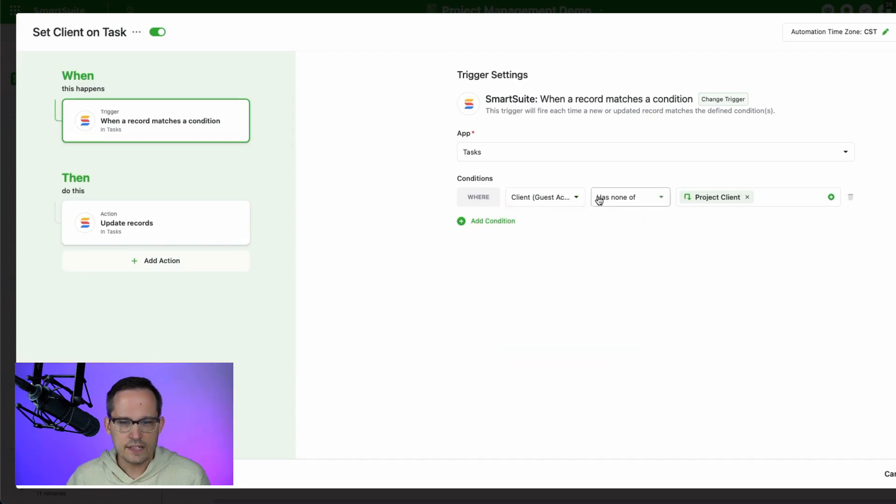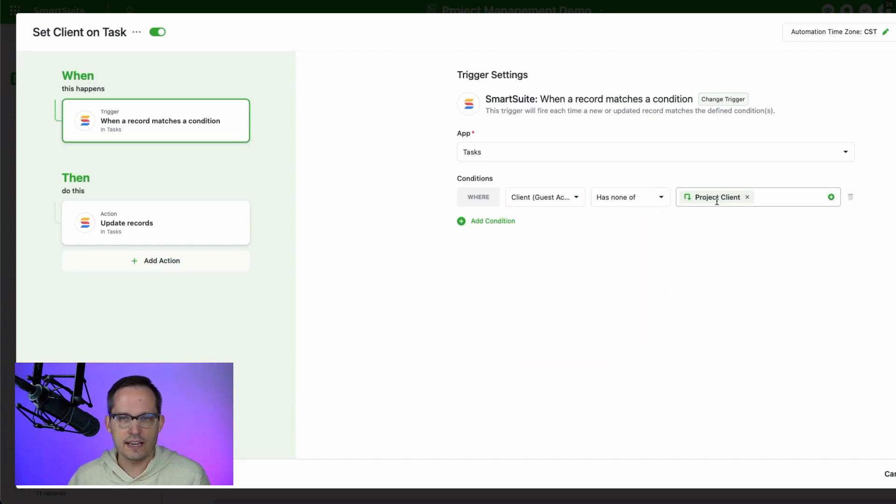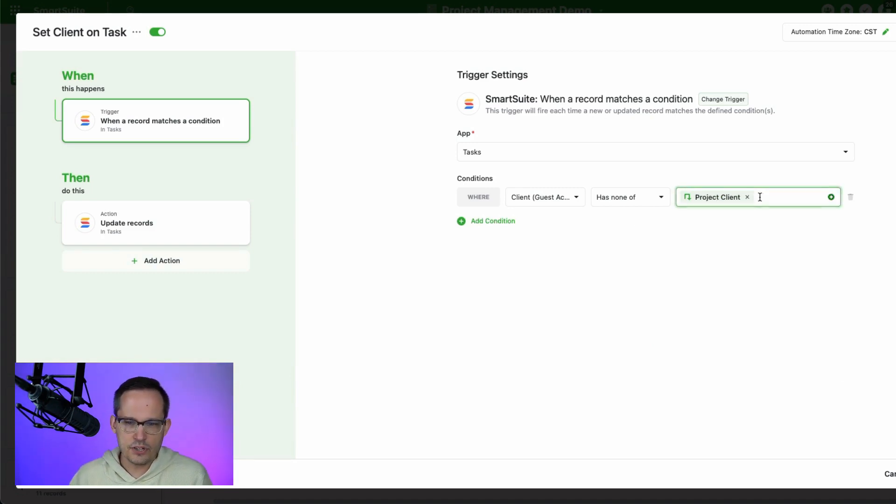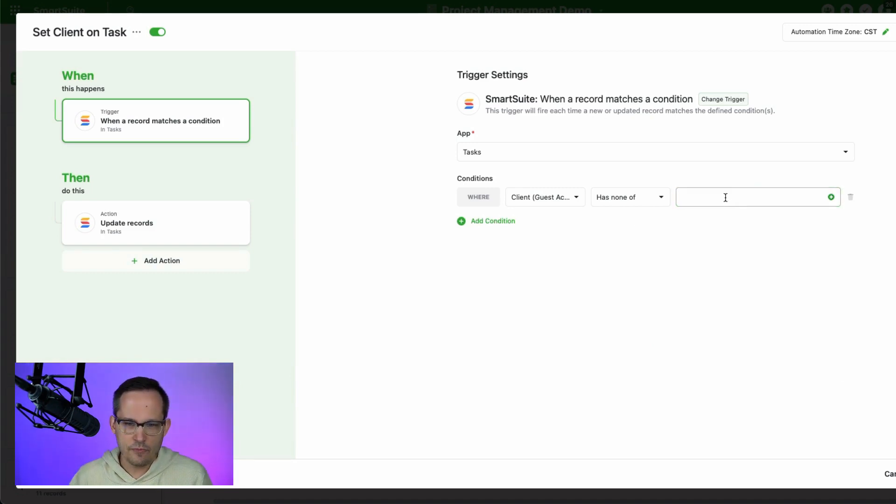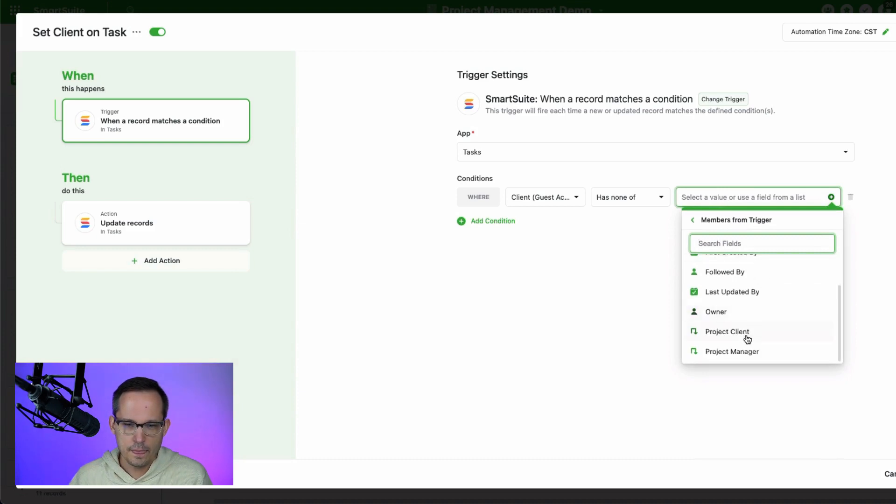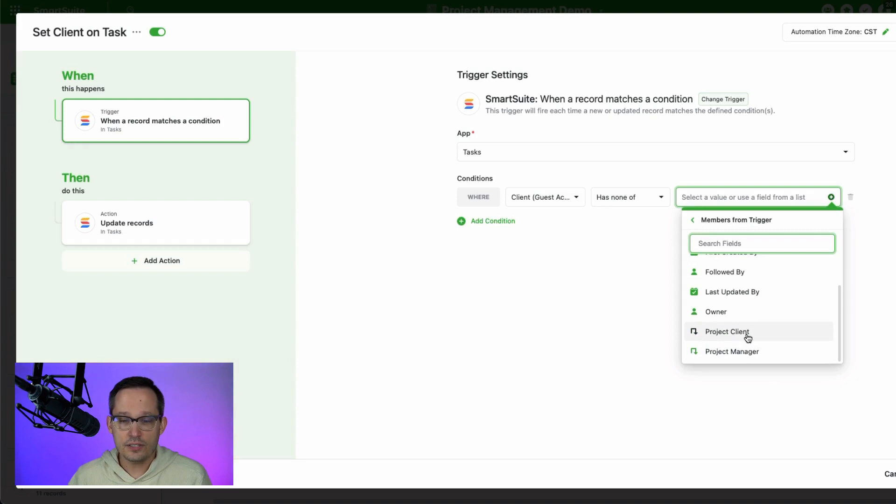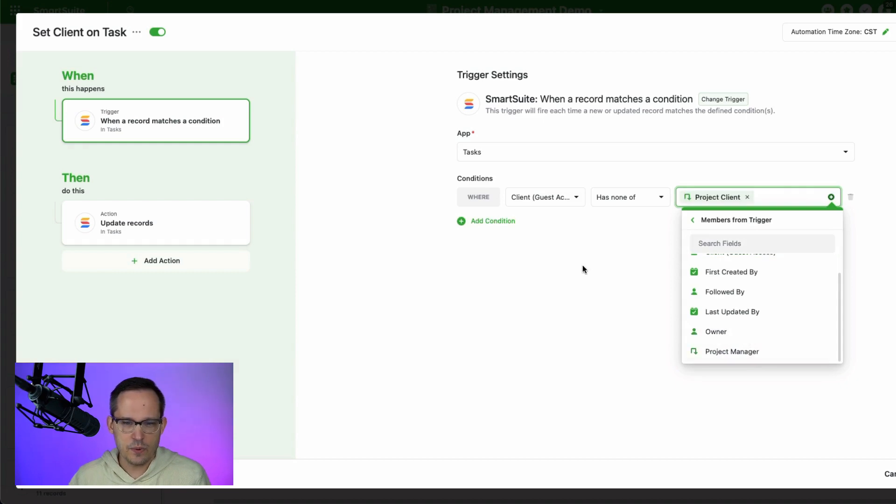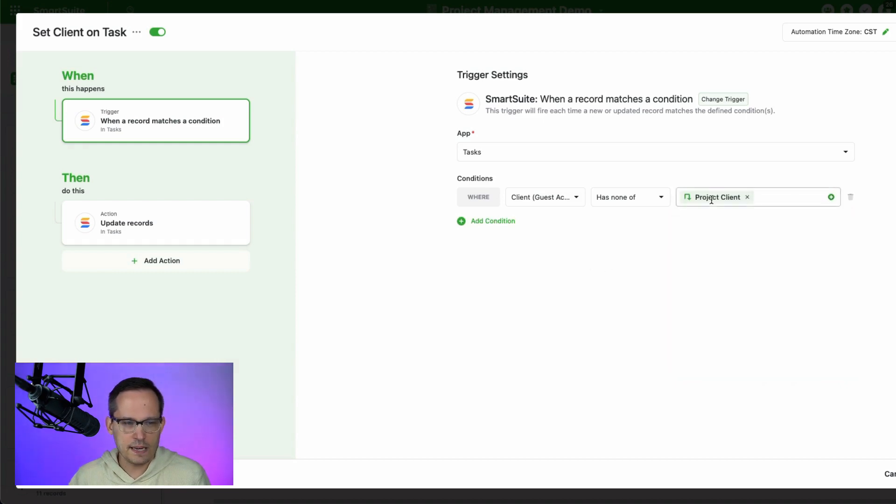Now our condition is going to be where that client, that guest access, essentially, if it's not matching up with that project client, because then we want to add the project client to it. So that project client is going to come from the trigger here. You can see we've got that project client, which again is the lookup field. We've also added another lookup field for the project manager, which is the owner in this case, like me behind the scenes, because we want to be able to update that as well.